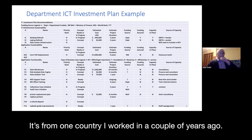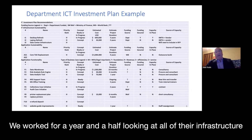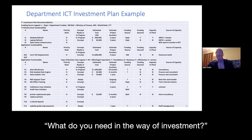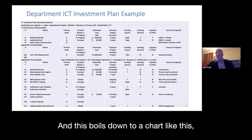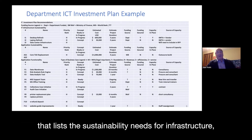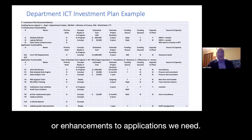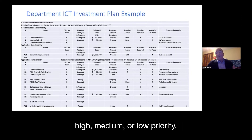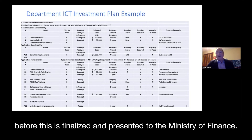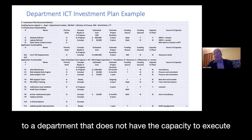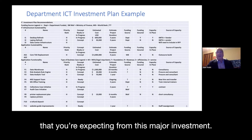I'll give an example from one country I worked in a couple of years ago where we spent about a year and a half looking at all of their infrastructure and applications, and talking with business lines about what new functionality they needed. This boils down to a chart that lists sustainability needs for infrastructure and applications, lists new functionality needs, puts a price on everything, and ranks them as high, medium, or low priority. In reality, only high-priority items make it — medium and low get scraped off before it's finalized and presented to the Ministry of Finance. It also asks hard questions: if I give you the money, where are you getting the resources to do this work? Approving a project to a department that lacks the capacity to execute isn't effective at delivering the expected business value.